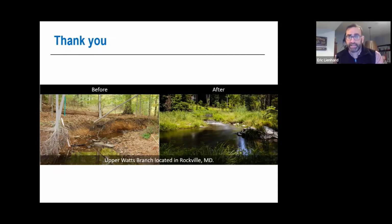So there is a planting plan that we worked with National Park Service on in terms of tree placement. I know that they had concern about some social trails that had developed over time. So not only will trees be where we've disturbed, like those access roads, to replant in those areas, and those areas will be fenced off for protection from deer and from the public for a little bit of time to give those trees a chance to grow and sustain. But also there's a tree bank to make sure that if something happens to those trees, they can be replaced. So Mark, did you want to talk to that?